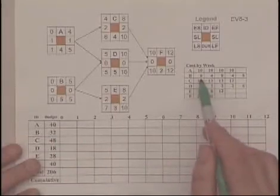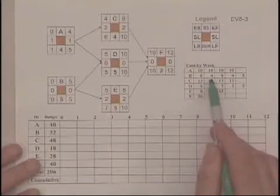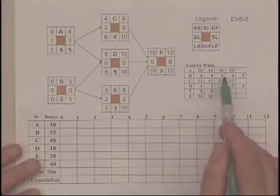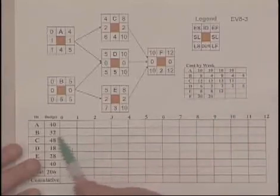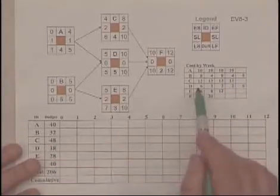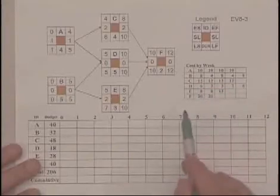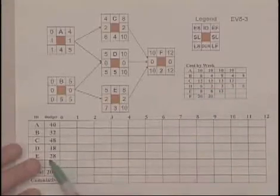We see the cost varies: $8,000 the first month, $4,000 the second, $8,000 the third, $4,000 the fourth, and so forth. Activity C has a total cost of $48,000 spread evenly across the four months.